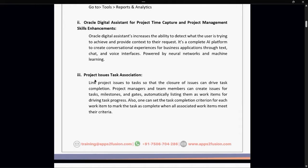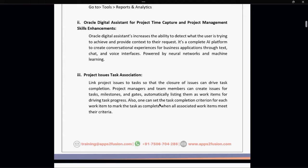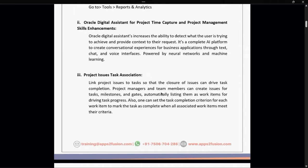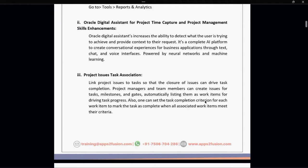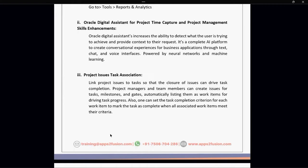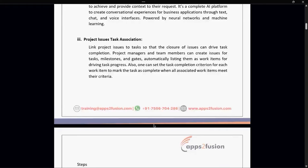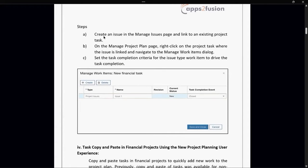Next part is project issues task association. In this, we can link the project issues to the task so that the closure of issues can drive task completion. Initially, we could not link issues with tasks so that when issues are completed, tasks won't automatically get completed. But now we can do it.